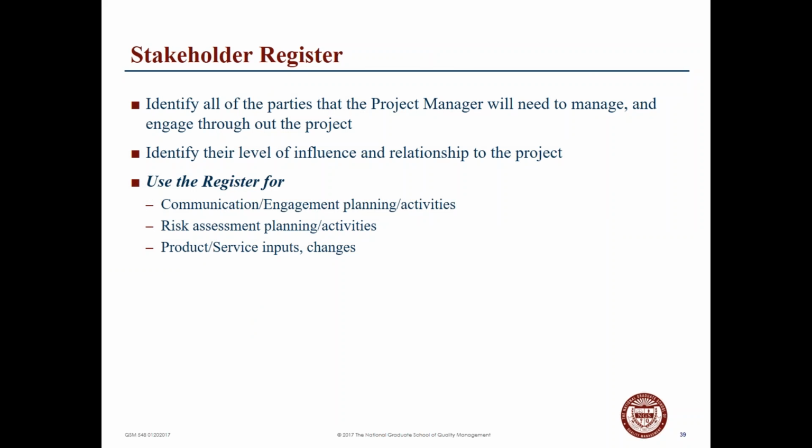So we've referred to in a few slides this tool called Stakeholder Register. This identifies all the parties that would need to be managed and engaged through the project. It would also identify what their level of influence is or the relationship to the project. You'd want to use this for comm strategy, engagement strategies, assessing risk, and looking at any sort of inputs or future changes that may come along.